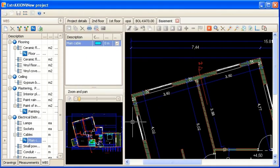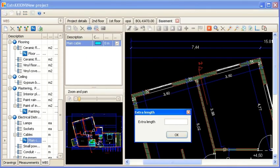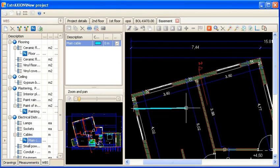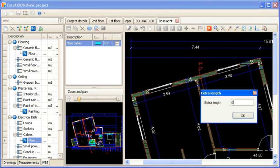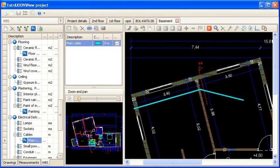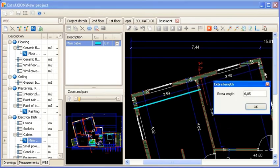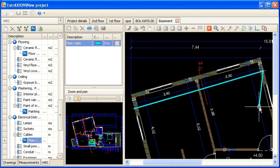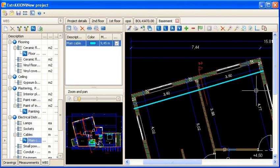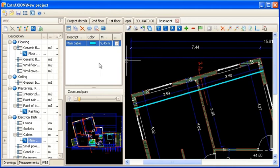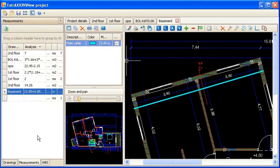This way, each time you create a node, you are prompted to add extra length if appropriate. For each node, you can specify how much extra length should be added due to obstacles such as beam depth. In the drawing measurement sheet, you can see the total measured length. And in the measurement tab, you can see the full measurement analysis.